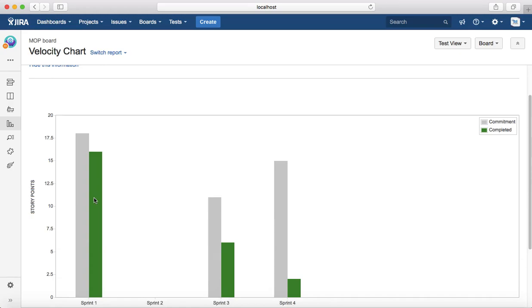This determines the velocity of your team. In the future, if your team is not able to deliver whatever points were planned in the last couple of sprints, then you can do a retrospective and see what the issues are.